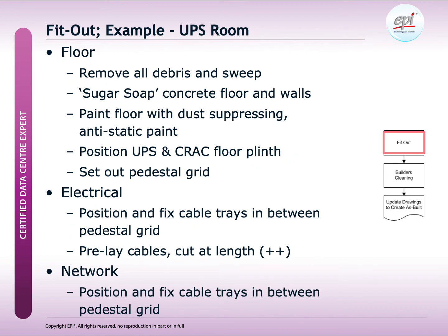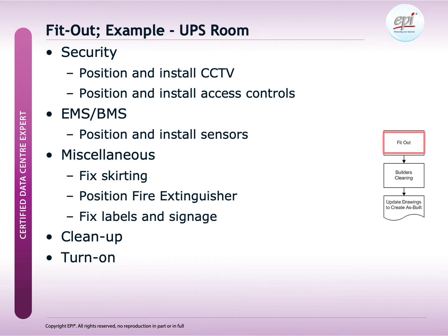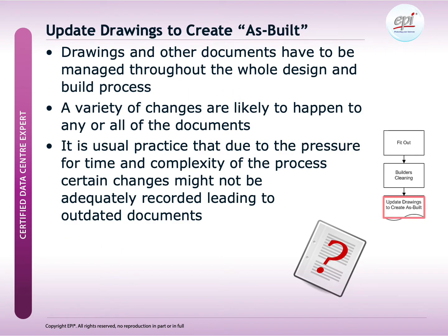In the description of the fit-out phase, we also give an example of the fit-out of a UPS room, where this is the first slide, and here we have the last slide describing the fit-out of a UPS room. At the end of the fit-out phase, we need to make sure that all drawings and documentation is up to date and represent the as-built situation.